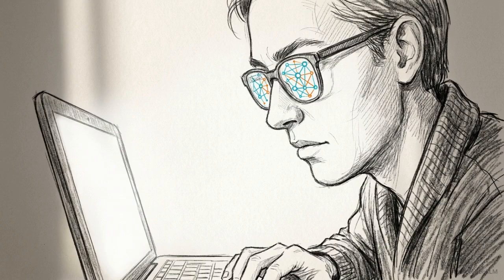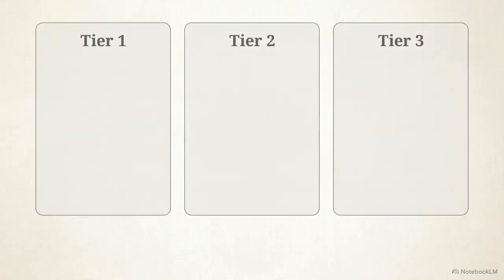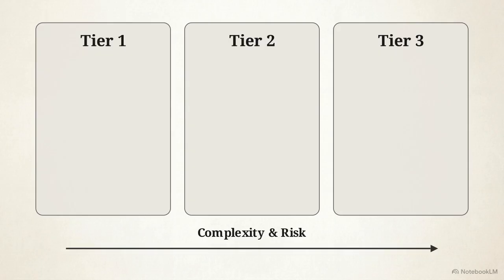Now that we have accurate baseline durations, we need to assess risk. Instead of slapping a massive lump sum buffer at the very end of your project, classify every single task into one of 3 distinct risk tiers. This matrix maps out the buffer you need based on complexity.